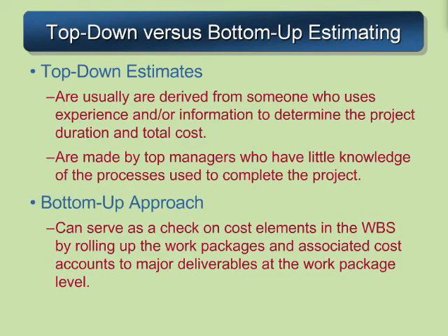As I said earlier, there are two types of estimating methods: top-down estimates and bottom-up estimates. In the top-down estimate approach, we're usually going from someone who has some experience or knows enough about the project so that they can give us a total duration and total cost. We'll use some of these techniques by top management to just get ballpark figures through a few of these estimating techniques so that we can get through our first go, no-go gate